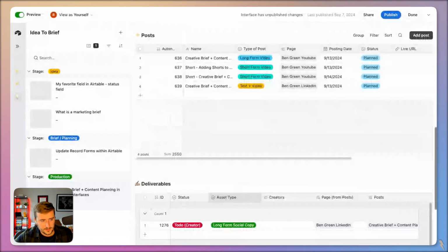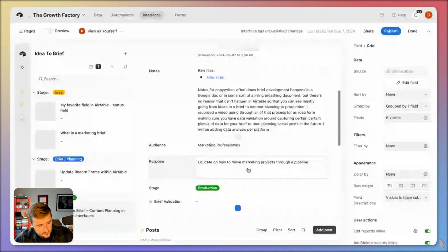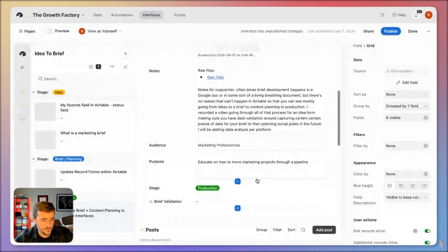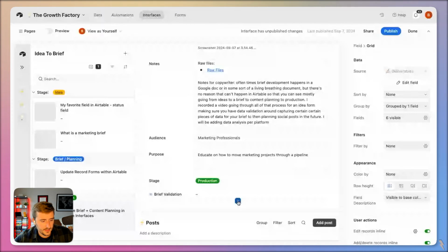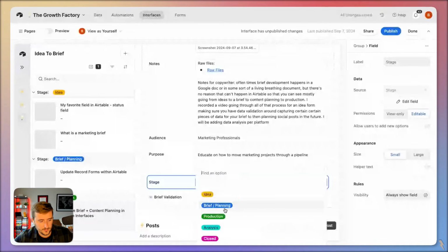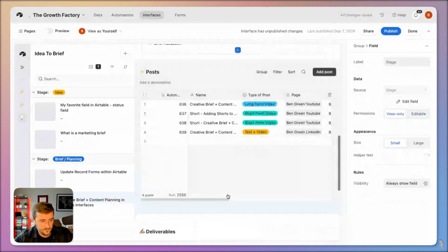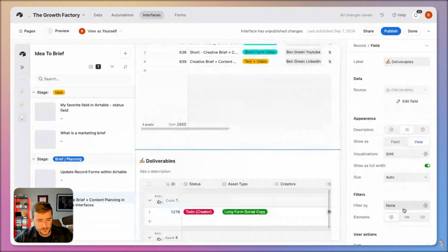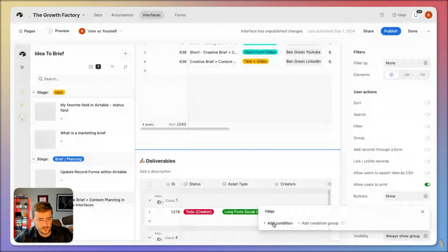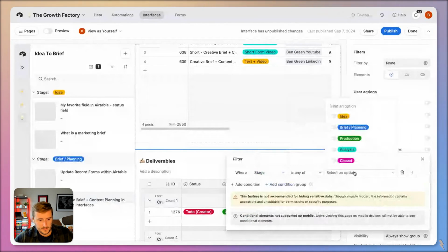And what I really wanted to show in this video is I shouldn't have been able to move this to production before. I should only be able to move it to production if I'm done planning my deliverables and assigning those to people, because if nobody's assigned to it, then it can't be in production. So real quick, I'm going to move this back to brief/planning, make it view only again. Deliverables should only show up. So I'm going to make this only visible if the stage is any of